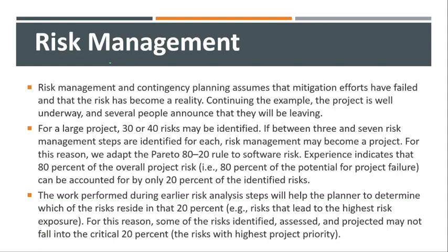Experience indicates that 80% of the overall project risk, that means 80% of the potential for project failure, can be accounted for by only 20% of the identified risks. Let me translate this after this.